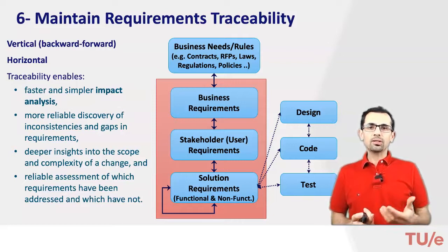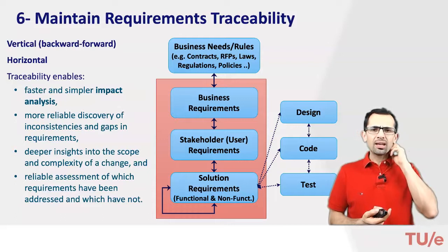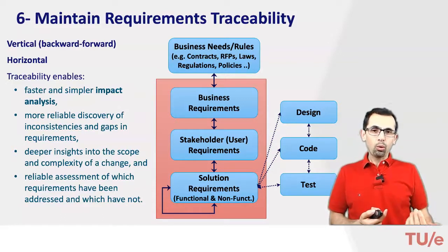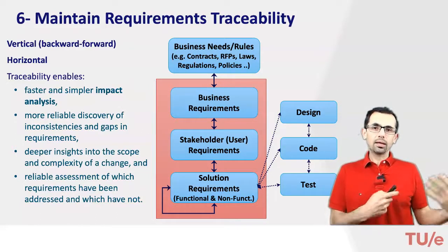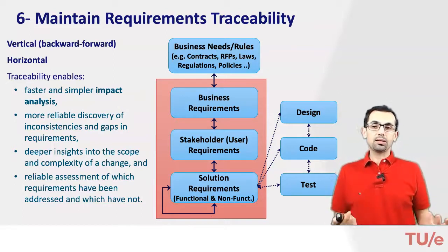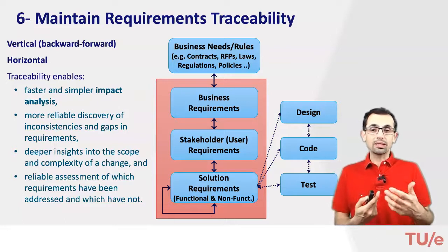Or if there is a solution requirement that's not linked to the user requirements, that is also a sign that either you have missed the user requirements, or you're doing some sort of gold plating. You're inventing new solution requirements which might not be necessary. So it helps us to understand whether we are complete. The same goes for design.